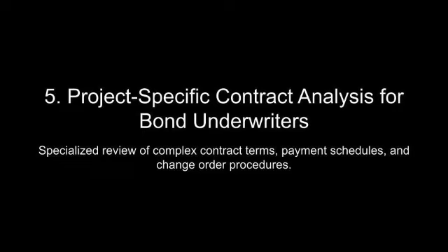Insurance clauses in construction contracts typically specify the types and levels of coverage that contractors must maintain to protect against various risks. Common requirements include commercial general liability, CGL, insurance to cover third-party claims for property damage or bodily injury, professional liability insurance for design errors or omissions, and workers' compensation insurance to address employee injuries.